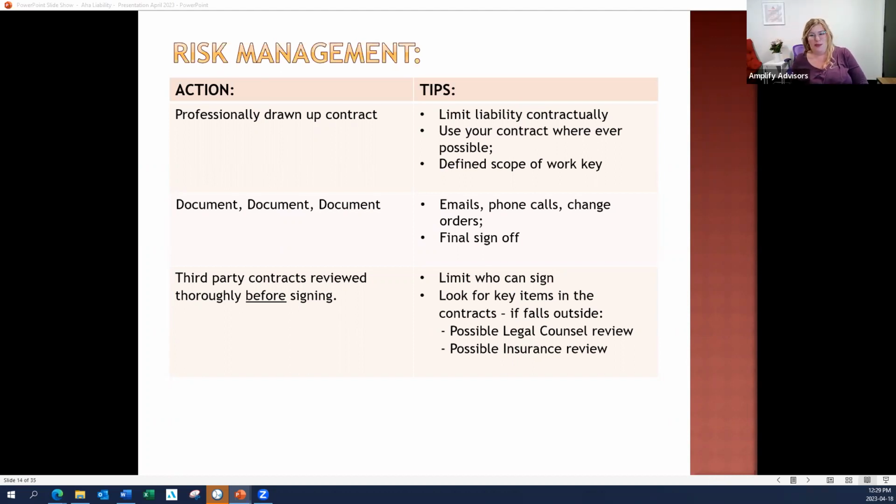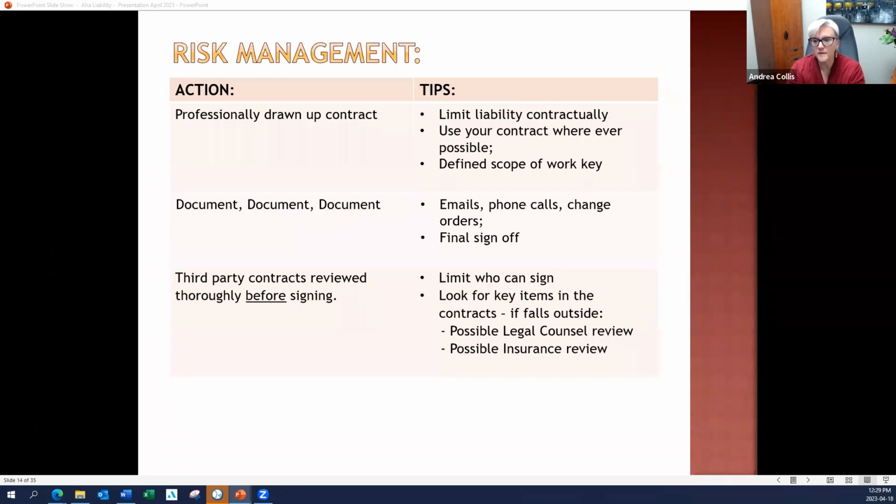But to the point that you made, the bigger the client, the harder that advice is to follow. Right. And that's why, the bigger the client, it's really important that your scope of work be as detailed as you can with the project terms, what's included, what's excluded from the scope. Yeah, that can help a lot.